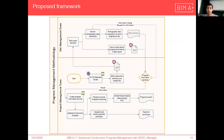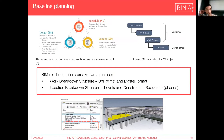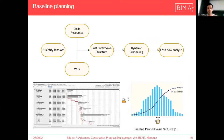After defining concepts and methods, we arrive at our proposed framework for progress management, using IFC, BCF for collaboration, and Bexel Manager to manage the whole process. Prior to the progress management itself, the establishment of work breakdown structures and construction sequence is a key step for organizing the project, defining it into stages and work packages, enabling an efficient and clear definition of the scope. The activities are usually defined under work packages being related to individual elements. The interrelation and linkage between the model elements, schedule information, and cost create the perfect scenario for the automation of cash flow analysis.